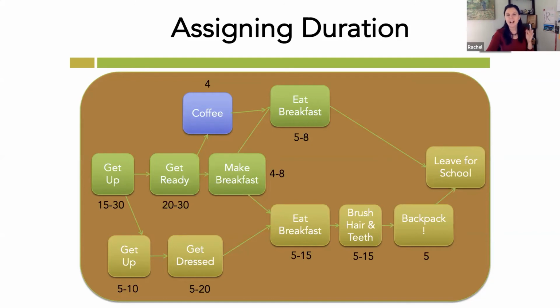Now, it's not as common showing a range for work. What we tend to do on a very, very big project is you can see where if you had a range for everything, it would be overwhelming. If you're not used to building a schedule, then the nice thing about doing the range is that you can create 2 different schedules and get a sense for what is an optimistic schedule and what is a worst case or pessimistic schedule.